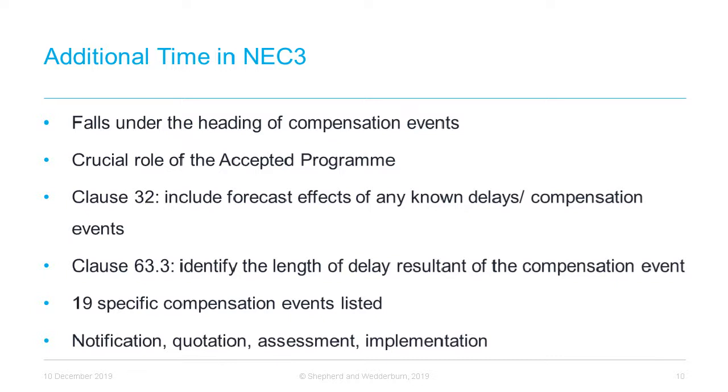However, the accepted programme should, at any given time, be the contractor's realistic and practicable plans for completing the works. Clause 32 states that the contractor should include any other changes that it proposes to make to the accepted programme, which should include the forecast effects of any known delays and compensation events.